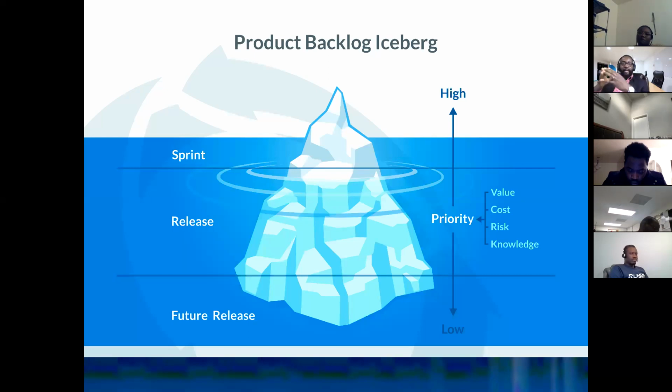So at the beginning, I would say you have a product backlog that is a big number of clear features. Now you pick the ones that are the highest priority, that bring the most value. You break them down into small stories, you refine them, you estimate them. As soon as you do that, just a small number goes to the top, right? And those are the ones that you pick up for each sprint that you work.